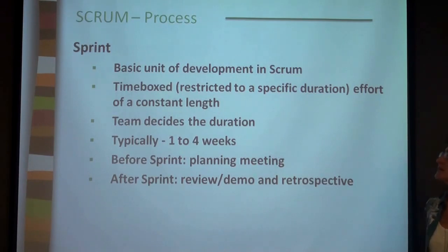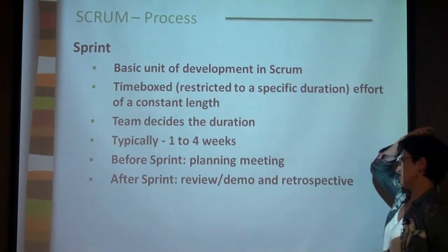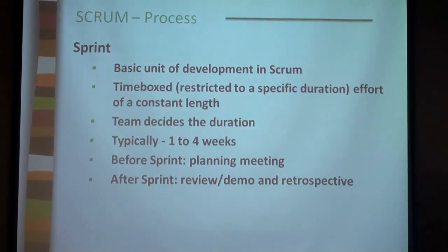Sprint, as I mentioned, is a basic unit of development in Scrum. It's nothing else but a time box, right? So typical duration is from 1 to 4 weeks. Can be 6 weeks, yes. And sprint is a time box, which means it is restricted to a specific duration of effort of a constant length.